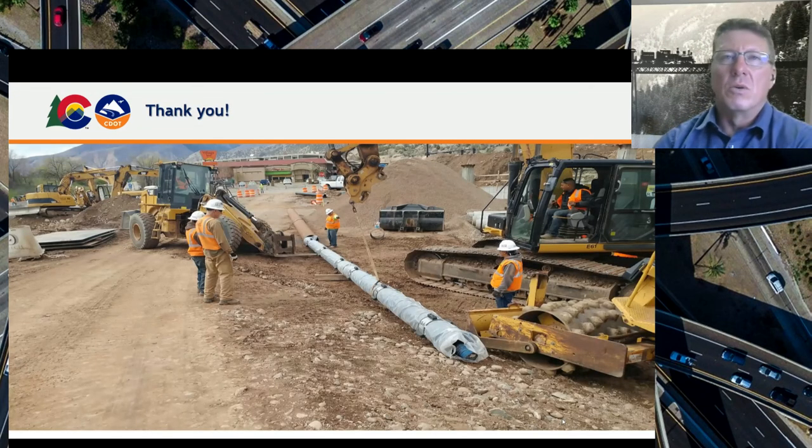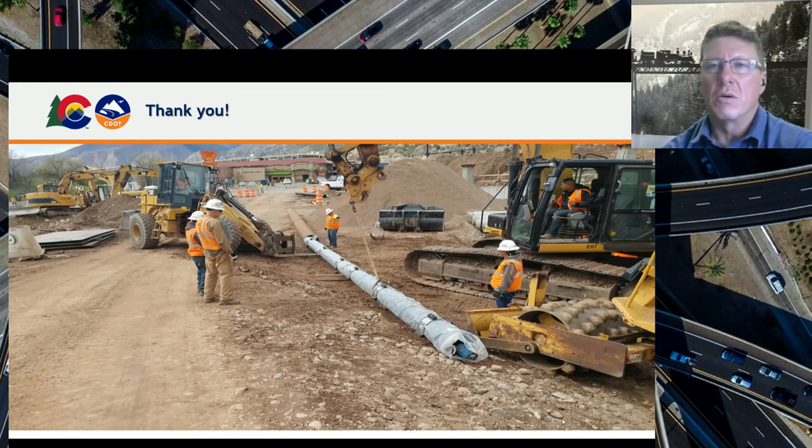So I want to thank you guys. I know I went through a lot, but our life cycle has certainly been successful on many big and large projects within Colorado as far as managing good quality existing data all the way through design, handing it off, taking it through the 75 process of documenting and through construction. And I'll emphasize that at CDOT, over the years, we have seen a lot of effort in utility coordination and maybe even investigating the existing utilities. And then we hand it off for construction without any oversight, without any mapping. And we found that the contractors have delays, have trouble during construction because not everything is identified during the engineering side. And so being able to continue to see that through construction is certainly important.